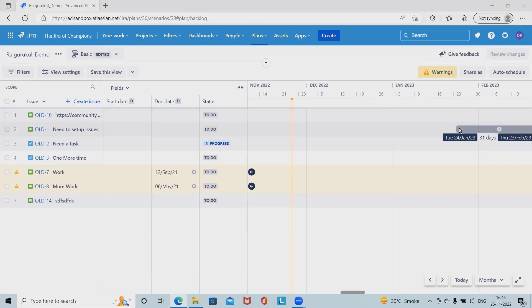When we talk about releases in advanced roadmap, this essentially functions as large target deadlines for sections or versions of our work. In the rest of Jira these are preferred as fixed versions. We can set a release to happen on set date or after all the issues assigned to it are completed.